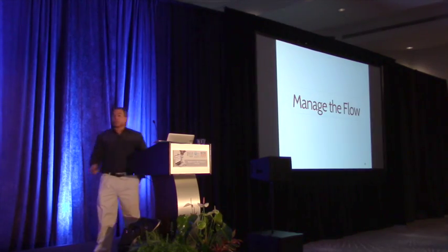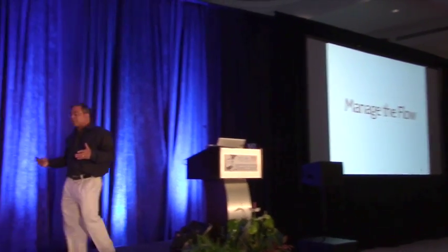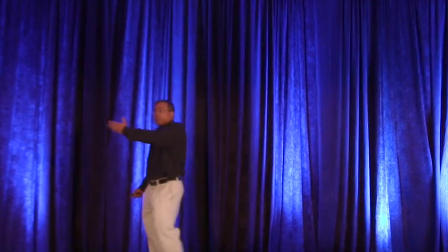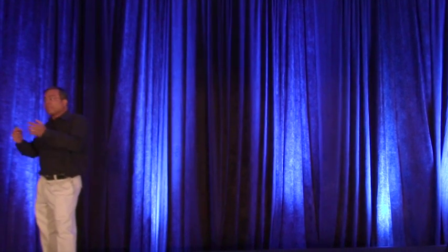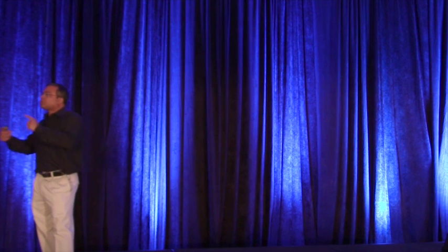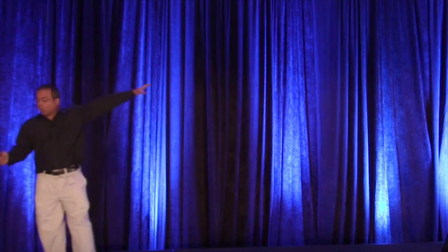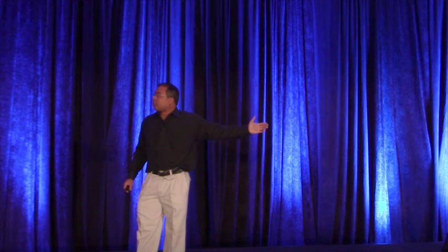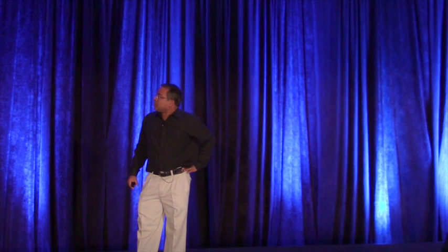Okay, so there you saw this cross-team, cross-project functional group. There were actually 17 waterfall projects, 17 waterfall teams, and 4 agile teams coming together, 1 or 2 representatives, not everybody from each team, 1 or 2 representatives coming together across the multiple projects, and they had this board. And the board helped them manage the flow of delivery, a flow of value across that 21 project team.